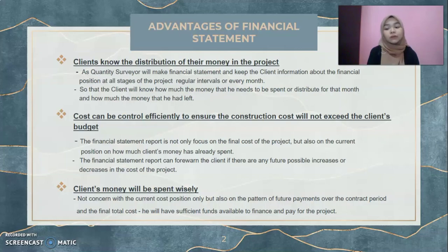Last but not least, the client's money will be spent wisely. Financial statements are not concerned with the current cost position only, but also with the pattern of future payment over the contract period and the final total cost, in order to make sure he will have sufficient funds available to pay for the project.